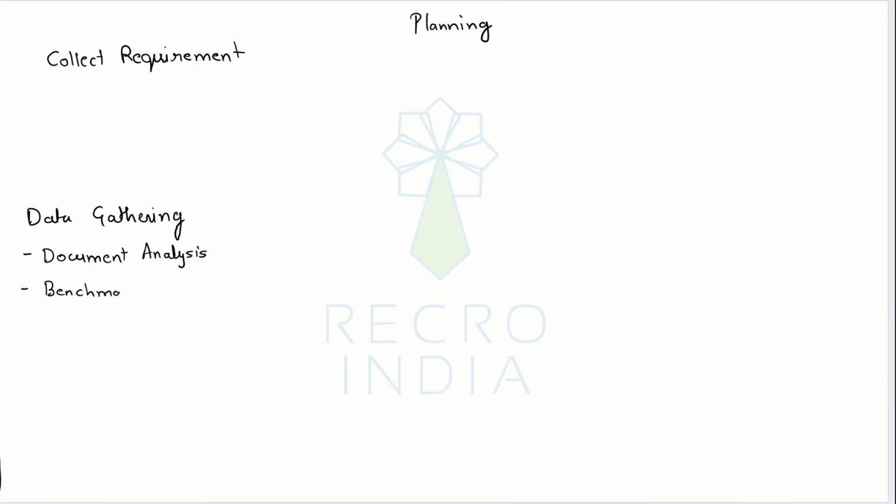Maybe we have some kind of existing product that we are upgrading or updating, so our current product or current service can serve as a benchmark, that whatever we have been delivering with the current product or service, we at least have to make sure that our new product or service includes that.